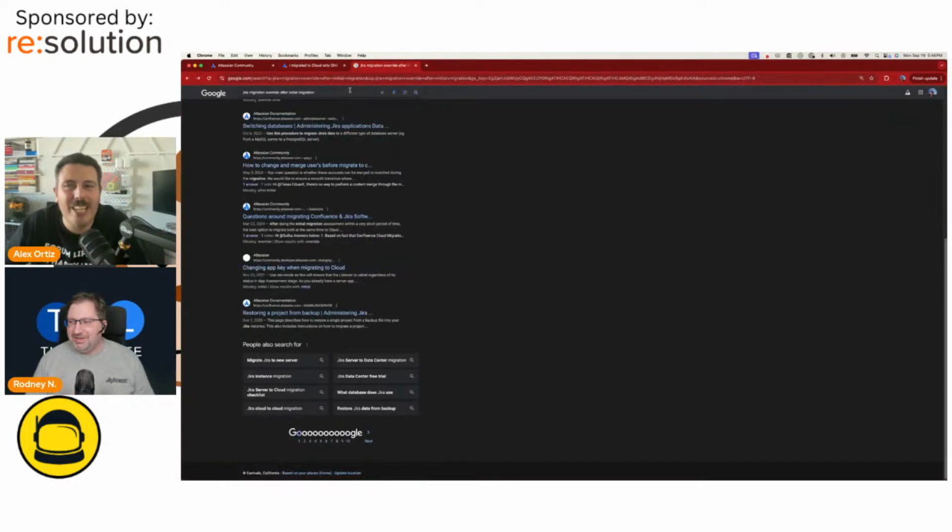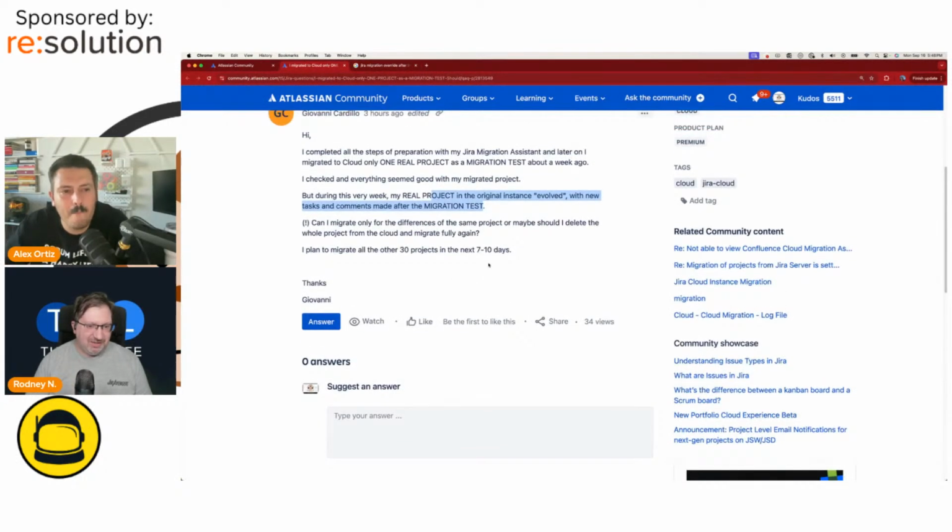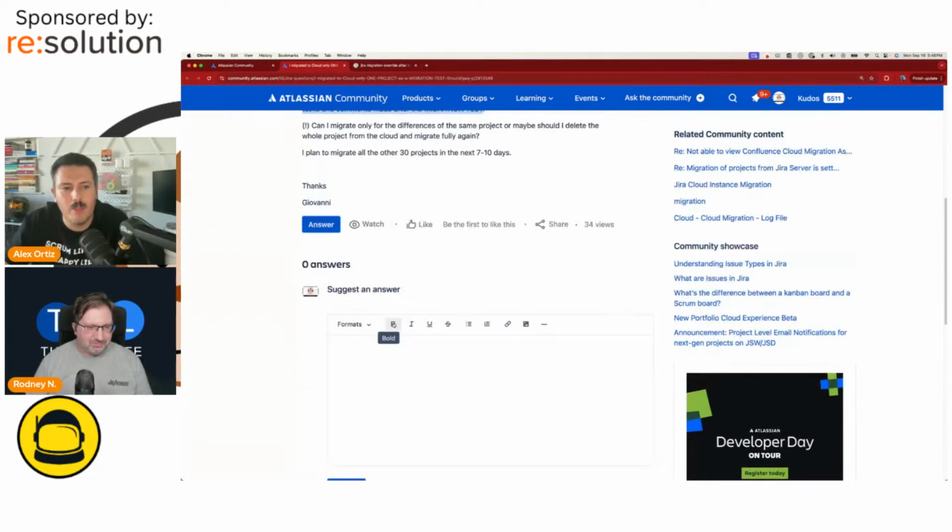So I'm trying to answer a question right now. When you do a migration, like a test migration, you bring a project over, it brings all the data over. Awesome. But if you wait a month and you re-migrate that project, it should override that project in the destination with the latest, right? Now, if I remember the question right, it is the only project in the site currently, correct? Correct. If I remember right, when you do an import, even if it's just a project, it will kind of reset the entire site, or at least the entire Jira instance, back to whatever the newest is. So it will completely overwrite the original project in the destination, which is okay because that's what he wants, right? Yeah. So I'm going to answer with that.